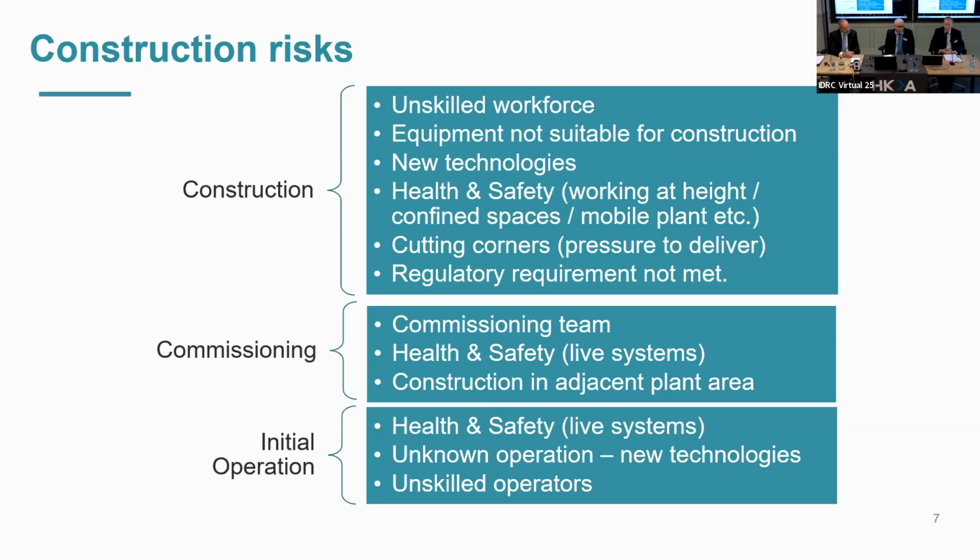Commissioning is slightly different. The commissioning team tends to be different from the construction team. And what you find here is that the health and safety risks are slightly different because you're working on a live system. One thing that's not often taken into account is that when you're commissioning a plant, you tend to have construction on adjacent plants, and this can bring its own risks and hazards.